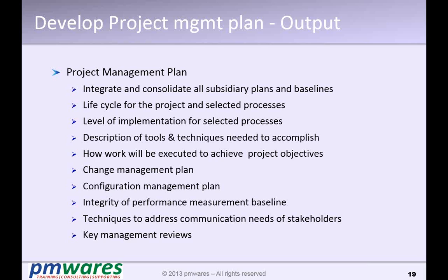So the configuration management plan is a plan which talks about a directory structure. It talks about how all the artifacts of the project will be stored, how they will be accessed, how they will be changed, all the process of changing the artifacts on the project. Normally tools which are used for this purpose are VSS, Visual SourceSafe, CVS, PVCS. There are many tools in the market, such as Subversion. The project management plan also defines the baseline and the performance measurement for the baseline. The change management ensures that the integrity of the baseline is maintained.